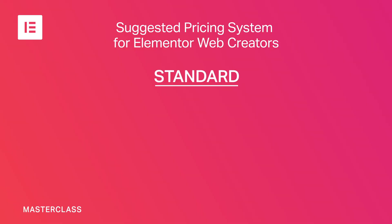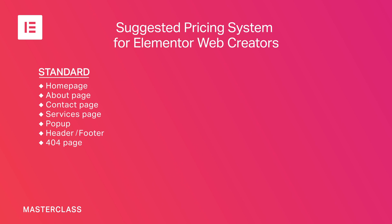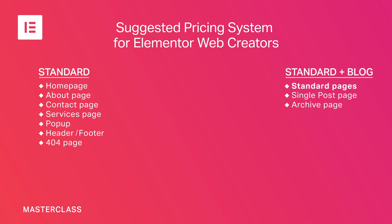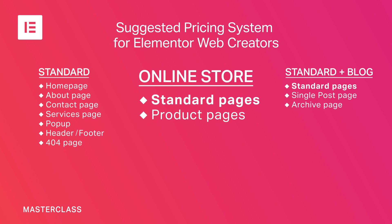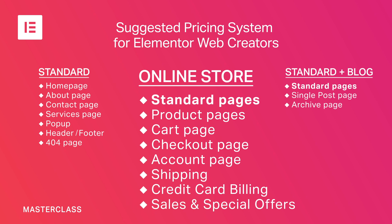We cannot give a client a competitive quote without a pricing system that ensures we are not undercutting ourselves. There might be an infinite number of possible website designs, but for the purpose of pricing, we can narrow them down to about three types. The first type is standard: a promotional or commercial website of five to seven pages, including a homepage, about page, contact page, services page, and assets like a header, footer, and 404 page. The second is standard plus blog, adding single post and archive pages. The third — and most demanding — is an online store, including product pages, cart, checkout, shipping, credit card billing, and special offers.